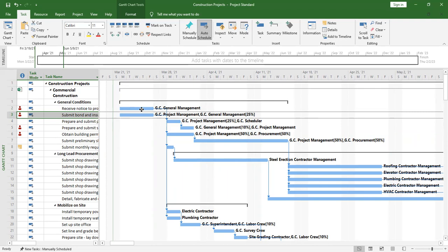I'll try to find out whether the software can do it automatically, but according to the knowledge I already have, you can work around that. You remove predecessors, you change dates, you decrease the duration, then you assign more resources onto the activity.